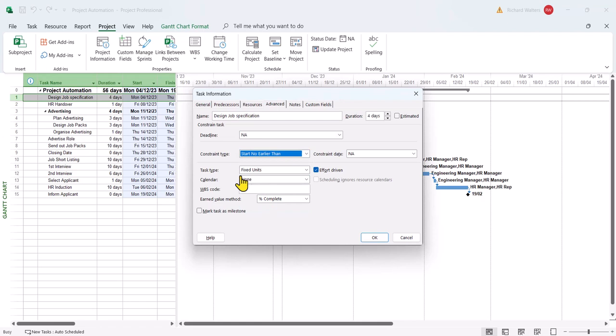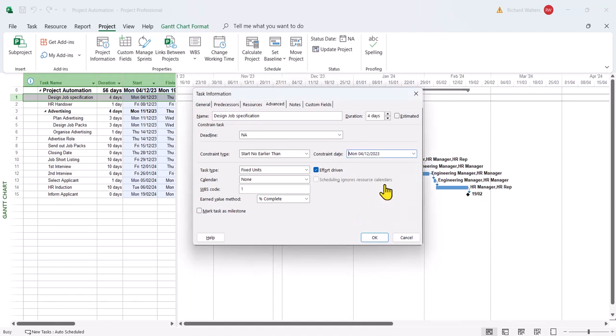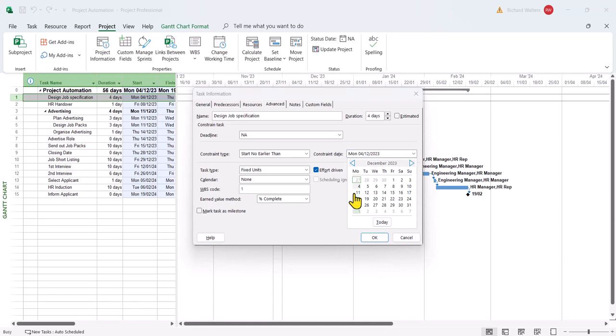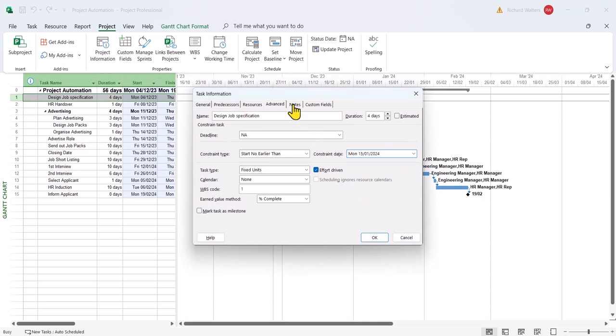Whenever I'm doing this kind of work, I'll always look at the start date of the task, which is the 4th of the 12th. And I'm going to count forward six weeks. So 1, 2, 3, 4. That's the 15th of January. I'm going to put a note in as well to say the engineer manager's on long-term illness.